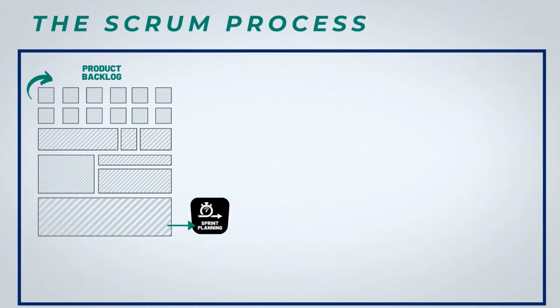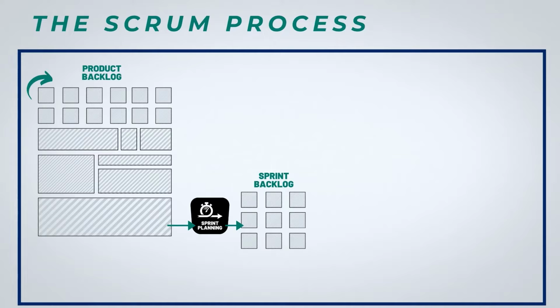The first day of the sprint, the Scrum team gets together for sprint planning. The sprint planning usually consists of 1. The Scrum team drafting the goal for the sprint. 2. The product owner providing and clarifying the backlog items that are candidates to be included in the sprint. 3. The Scrum team deciding what the team can complete during the sprint and an idea on how they will complete the items. The team uses the definition of done as its guide for estimating the size and figuring out how to complete the work.